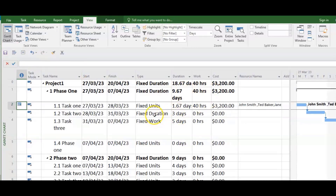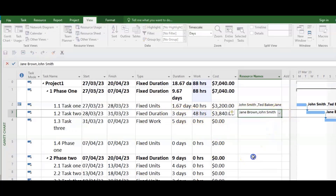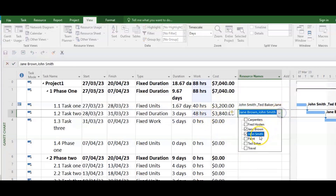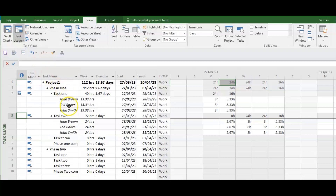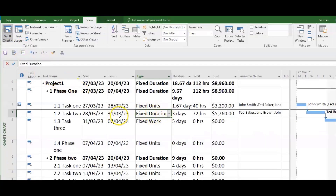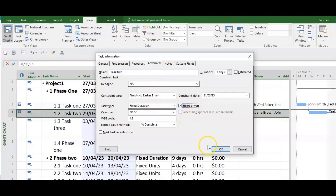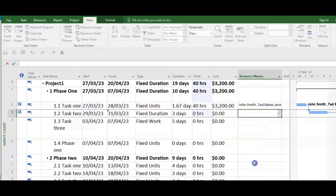Now we're going to Fixed Duration — where duration is supposed to remain the same. If I add Jane it's 24 hours (8 × 3). If I add John it's 48, because each person is getting 24. And if I add Ted it's now 72. Going into Task Usage, each person got 24 hours making it 72 total. So let's go back, change Fixed Duration to effort-driven via Advanced, and click OK. Before, it was 72 hours and duration remained fixed at 3 days. Now with Fixed Duration set to effort-driven, as I add Jane it's 24.